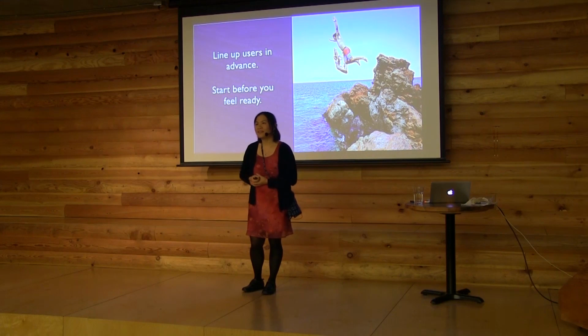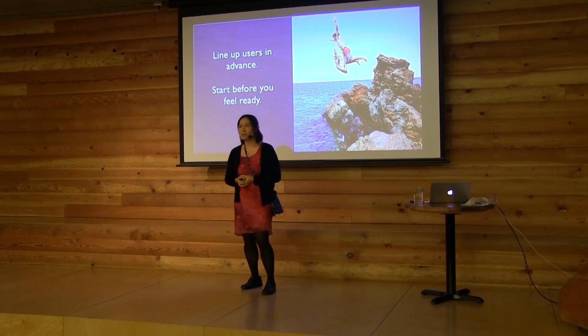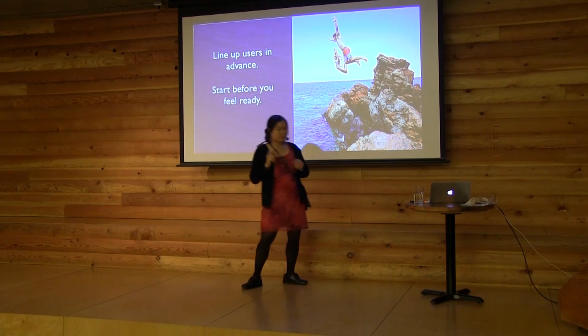I have a couple questions. One was just about this. Have you ever done it where instead of just lining up users, you actually schedule the users as well? Sorry, I was talking to Peter Hughes, if anybody knows who that is, and he was talking about what Meetup actually does. They just constantly schedule user testing. It's just always on the calendar. You have to prepare the test, and you better do it.